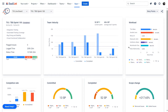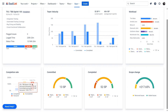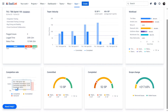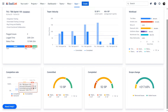The completion rate is a metric that measures the percentage of work items completed within the sprint. It includes three parameters: Completed — items finished within the sprint; Incomplete — items not finished in time; and Carryover — unfinished tasks from the previous sprint.